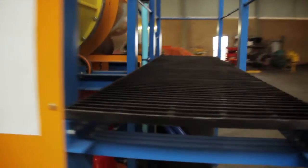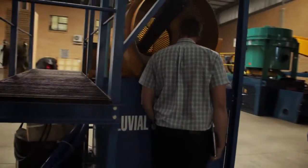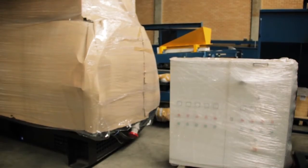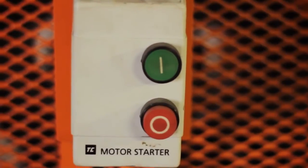They think even 20 weeks is a long time, and we do manage to, in fact, produce these plants in about 20 weeks. That is a phenomenally short time, and more importantly, we pre-assemble the plants. They are pre-manufactured here, pre-assembled, pre-plumbed, pre-wired, so when it gets to site, it is literally plug and play. And also capital costs are a lot lower.